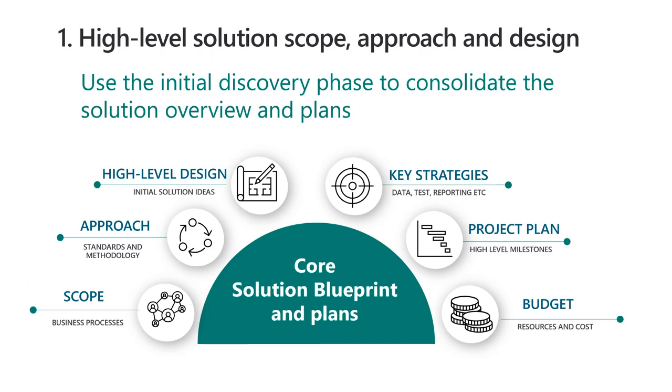I also mean the standards you're going to adopt, the approach you're going to take for those things that may not be covered by the methodology directly. So if change management is not part of your implementation methodology, that is something that you're expecting the customer to bring to this project, then that is covered by the term approach. In other words, you've got an all-rounded view of how the project is going to deliver the solution.